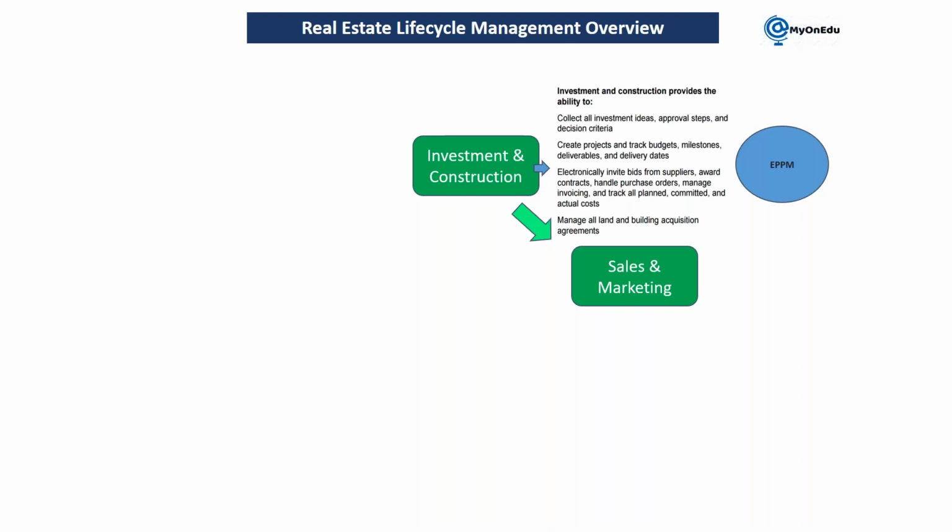Then how you can perform the procurement process for services and material, and how you can get actual cost into your project. Once actual cost is coming, then how you can settle it to AUC, asset under construction, because we are talking here about investment projects only. Once it is in the AUC, then finally my product is ready. I will create one asset and then we will settle it to the asset. So a simple cycle will be explained here. And once your asset is ready, it means your master data can be created here in ReFx now.